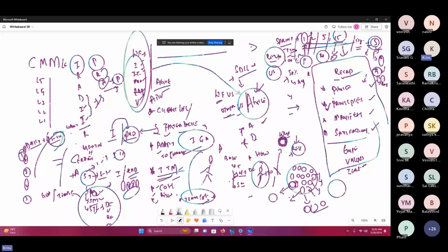Here you'll have 6 to 9 of your team members, as it is a defined size. It shouldn't be more than 9 people, because if you have more people in the team, the communication between people would be very less. That's why Scrum strongly recommends not more than 9.